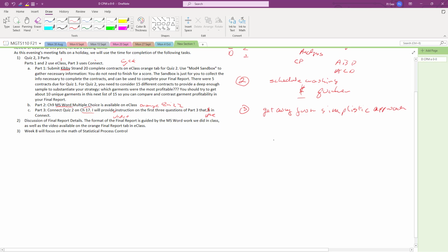Instead of that, for every task we're going to have what we call the optimistic time, which would be the shortest, with a label A, and then we would have the nominal amount of time that it takes to do it, which is represented by M, and then we'd have a pessimistic time, the long term, like the worst case, if you want to think about that.